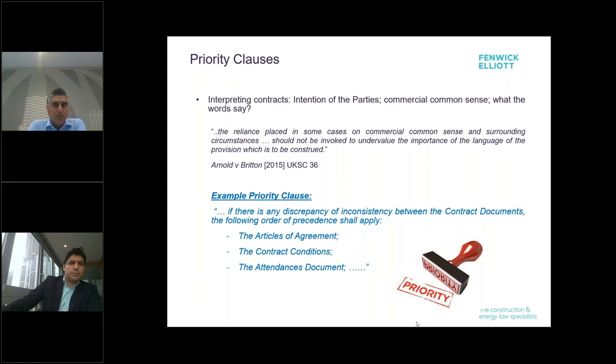And I guess priority clauses follow on from Jatinder's point on entire agreements, which really look to try and pin down what's in and what's out of the contract. We all know that construction contracts are often a whole collation of documents put together, drafted by different authors at different times, and actually thrown together at the last minute to get into contract. So there's a lot of scope for discrepancies, errors, and differences.